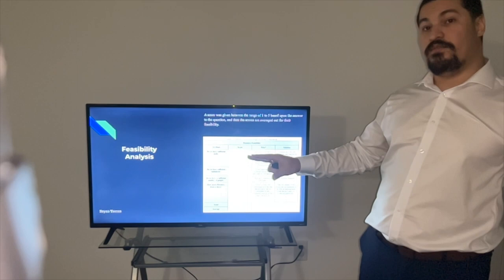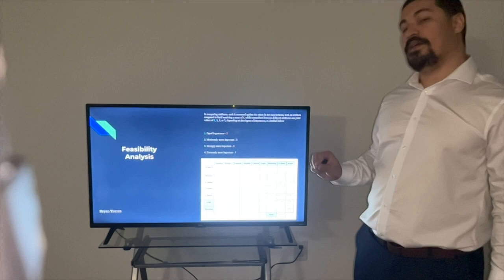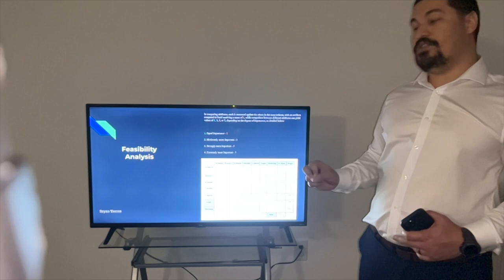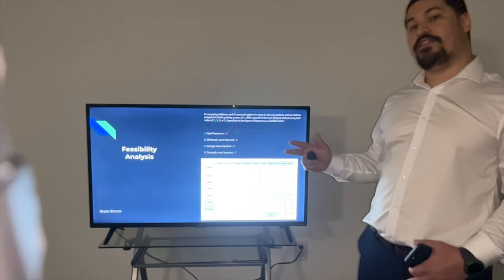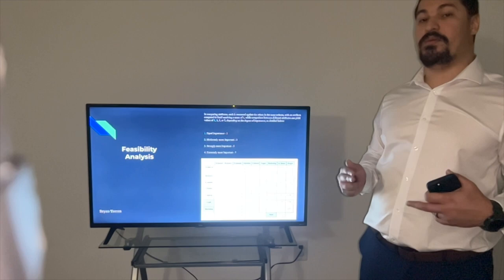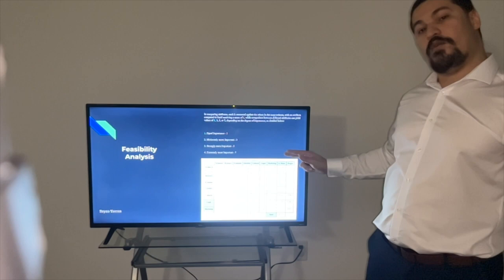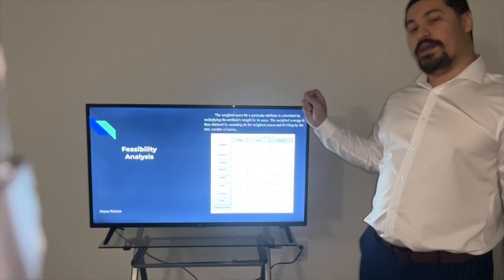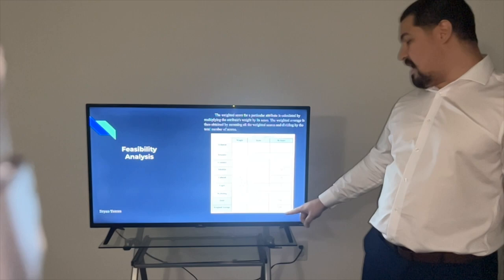A second table that we present is where we measure each attribute against each other. We gave a score of equal importance of one and then the highest being extremely important on seven, which of these attributes we consider the most important in our team. We calculate the geometric mean and the weights and we calculated the total. We use those weights and the weight scores and we added the scores and we calculated the weighted average of everything. In our case being 4.60. Anything above three means that our project or proposal has a higher likelihood of succeeding.